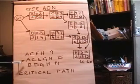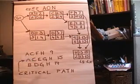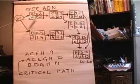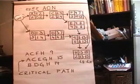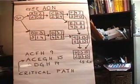But you're probably not going to want to figure out the critical path this way in a real project because there will be maybe hundreds or thousands of activities and far too many paths through the network. So instead of enumerating all of them, what we can do is go through this procedure and calculate with a forward pass, the earliest start, earliest finish for each activity, and then later with a backwards pass, the latest start, the latest finish for each activity.